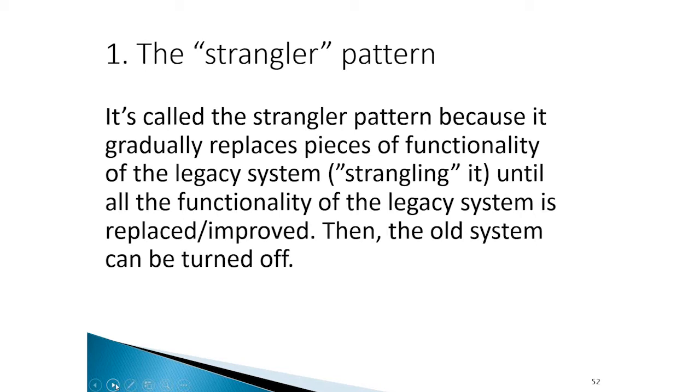alternative is we just go off and then we have 2 parallel tracks. We have the legacy system, and then we develop the new system. We might develop the new system under a traditional waterfall method. So say after 2 or 3 years, or after all of our development and all of our integration and all of our user acceptance testing is done, then we turn on the new system in one big bang, and then we decommission the old system. So the alternative to the strangler pattern is that big bang. We try to replace everything at once.